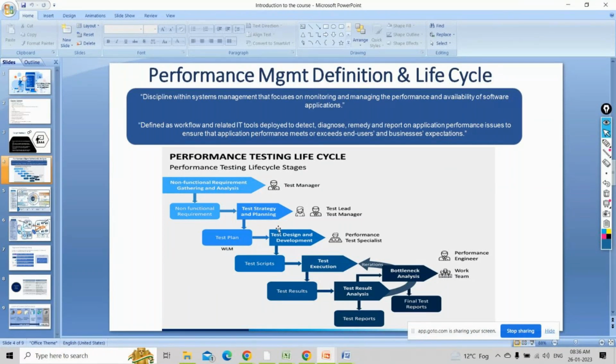That's why I said when you are doing performance test strategy and planning, at that time the SOW gets signed, because by this time you have a clear picture that the project will get executed within 3, 4, or 5 weeks. So you can do a calculation around that, saying I need 3 resources to execute this by the end of Feb, and you can quote them that. But if the client says they want extra effort put in, okay. Once everything is certified, all the KPIs are met, we can close this project, as we will have submitted our final test report.